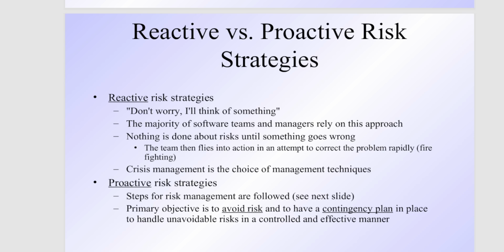That means if you come to the management and say, okay, I feel that person may leave in future, he is a very core, hardcore developer, so we will have problems implementing the code. They say, okay, I will see something, I will develop something, I will think about something. He will not take any action until the person leaves. So this approach is called reactive strategy.